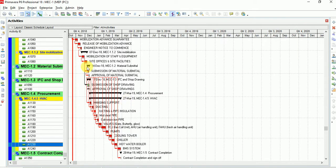This is the Gantt chart — you can see the project start date. The red colors of these activities show that they are on the critical path. The green colors show that those activities have free float, meaning you can delay that activity and it won't affect your project completion.